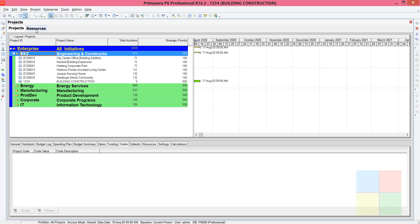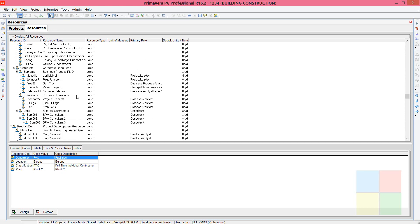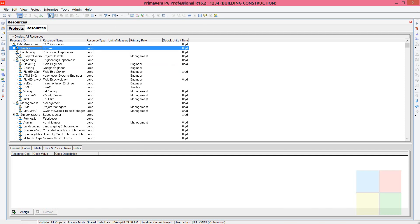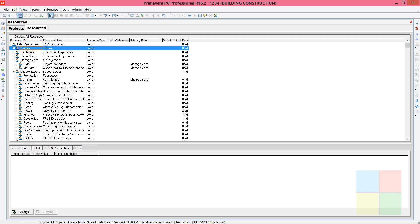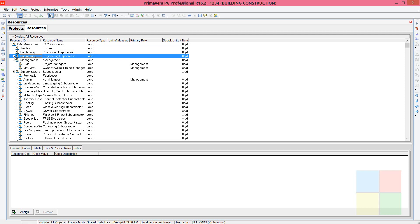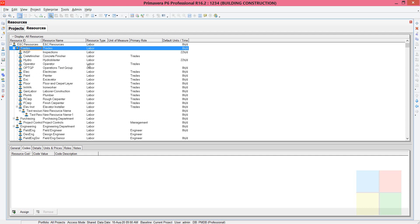The project window and resource window are different. In the resource window you can see all the available resources in the company — they can be labor, non-labor, or material. As you can see there are a number of resources. I'll be considering only four or five to explain this. The resources are grouped based on department, like which resources come under Trades, Purchasing, Engineering, and so on.